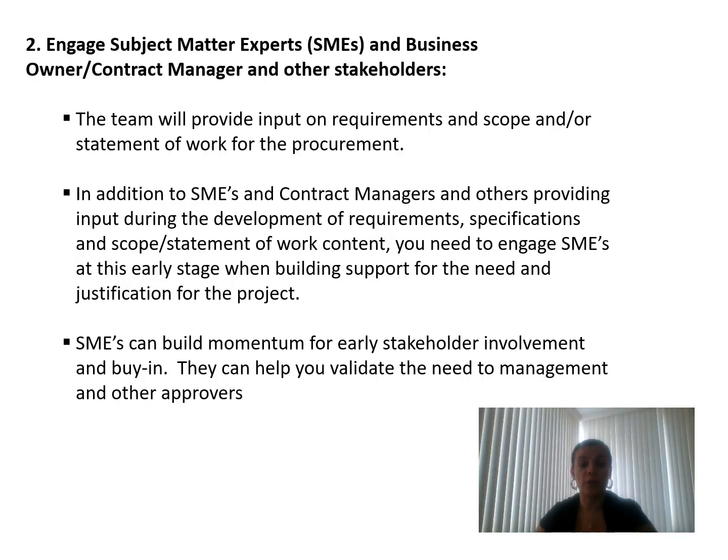Number two, you engage with a subject matter expert, a business owner, contract manager, or another stakeholder. You need their input on the requirements and the scope of the statement of work of the procurement. You need more information to start the procurement process. In addition, the subject matter expert or contract manager will provide you with the requirements, the specifications, and the scope of the statement.